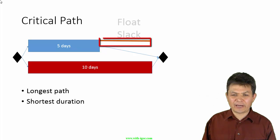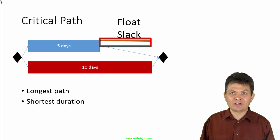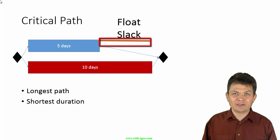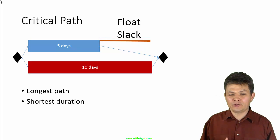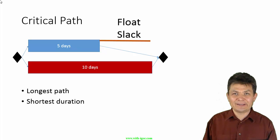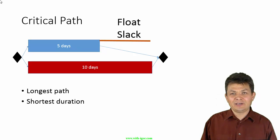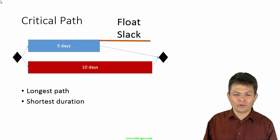That additional time has two names, float or slack. Float because, think about it, you can literally float this 5-day task back and forth. You can start later, 5 days later, finish in 5 days, and you can start at the beginning of the project. It will have no impact on our schedule, on our project duration.